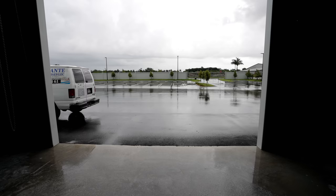Right. So let's walk to this facility now. We got a window here where there's no rain. Right now, this door that's open here is what? No, not the new building, the existing building where you guys are producing. That door right there is where product that's close to delivery comes out of the factory, and QC will take over, which is Chris. QC means quality control. Right, quality control. Captain Chris handles the sea trials, punch list. The boat moves down to our facility in Key Largo, where we have Mark Berta, our service manager, who handles additional QC items and punch lists, and makes sure that the boats are punched out.